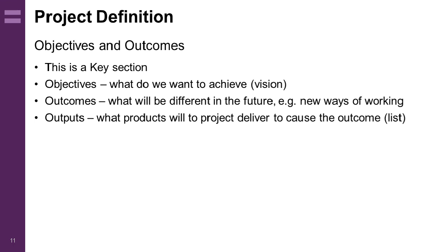The outcomes and outputs need to be SMART. They need to be specific enough to know when something has been delivered, i.e. not described in vague terms. They also need to be measurable. This may be as simple as saying, yes, a document has been created, or it could be relative, as in a wasteful activity has been reduced by 10% on average, or an actual measure, for example, 100k has been saved in a year. They do, of course, need to be achievable.